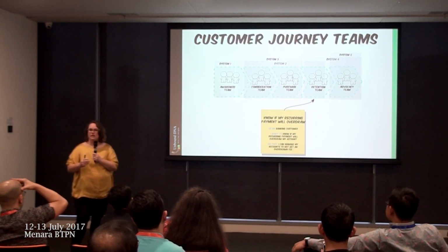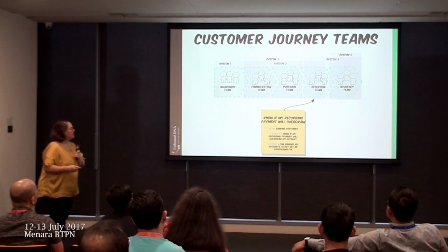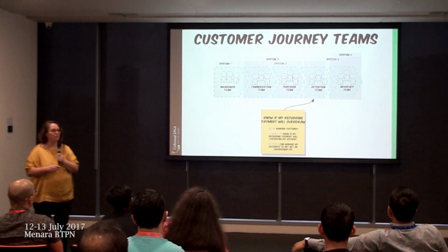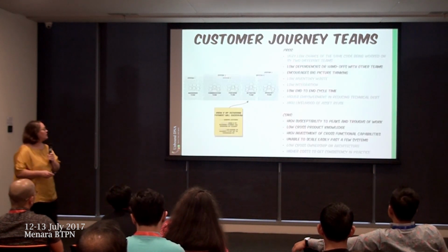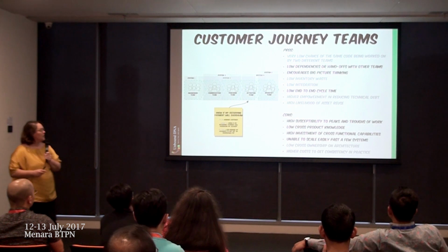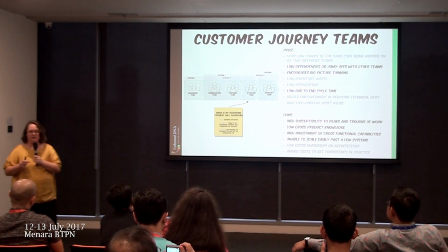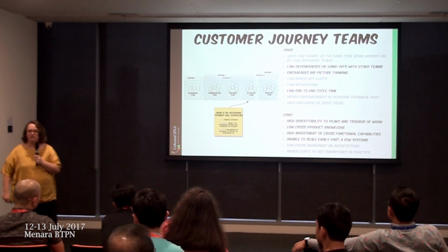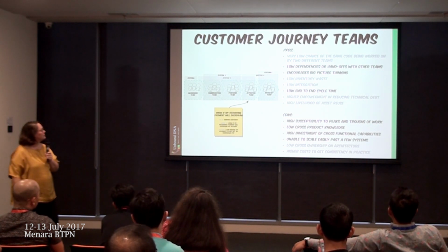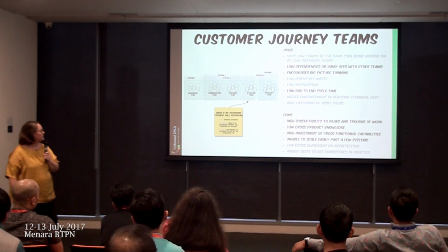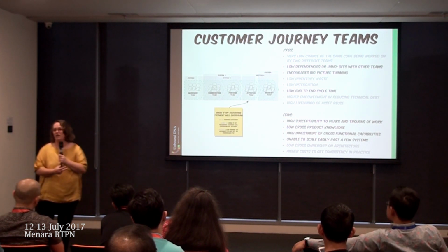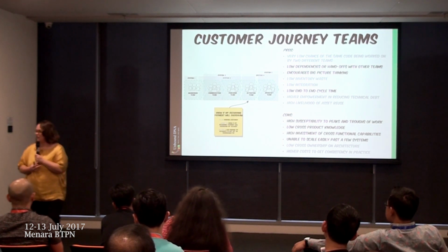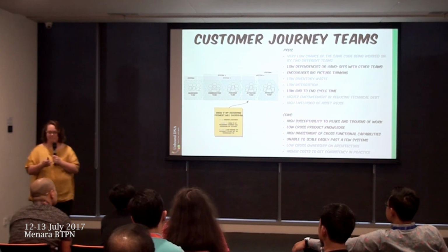So either of those patterns. And so the benefit associated with this, other than the fact that it's potentially going across, again, multiple capabilities from multiple systems, is that it should really reduce some of those dependencies down, because rarely do features end up going through multiple parts of customer journeys. So low cycle times. If you're after a really good example, think Lloyd's has a really good white paper on how they've done customer journey teams that you can see.